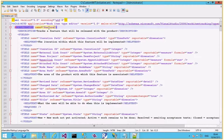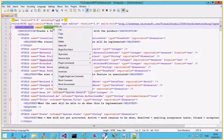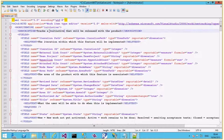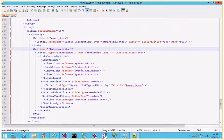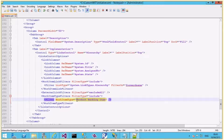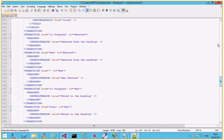Rename the work item type to Initiative and also change the description — let's say 'Tracks an initiative that will be released with the product.' Then go to the Implementation tab. In this tab you can see the hierarchy, which is used to define a child item. When I go to a Feature's Implementation tab I can create a child item as Product Backlog Item. Now this is Initiative, and its child item will be Feature. So I have to change Product Backlog Item here to Feature, so that when I create an Initiative I can implement it into Features.